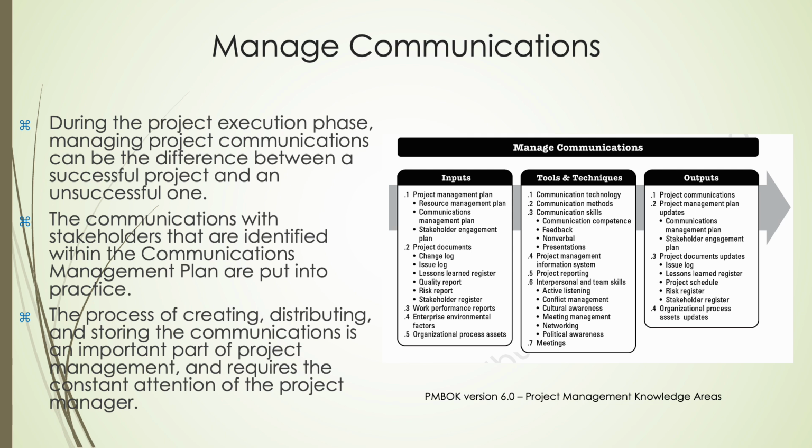Managing communications is a crucial process that ensures timely and appropriate collection, creation, distribution, storage, retrieval, management, monitoring, and ultimate disposition of project information. The process relies on key inputs such as the project management plan, various project documents, and work performance reports. Utilizing an array of tools and techniques, including communication technology, interpersonal skills, and project reporting systems, project managers are able to deliver relevant information effectively to stakeholders and team members.